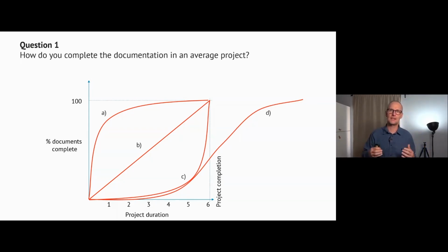Even in large companies, it seems like we finish the documentation way too late. Now, I would say B is a good approach. You could argue, yeah, but we have more records at the end. Sure, that's true, and you would go closer to C. But still, people are waiting way too long to get started on the documentation. And this is one of the places where good document management systems really helps, because it facilitates the creation and review and approval of documents. So that's a good thing. And I appreciate what Nick and John are doing in that field in the medical device industry. So the trick is to get to B, or even possibly A, and front load your project with the documentation to get it going in a really good way. That's one good piece of advice, if you ask me.